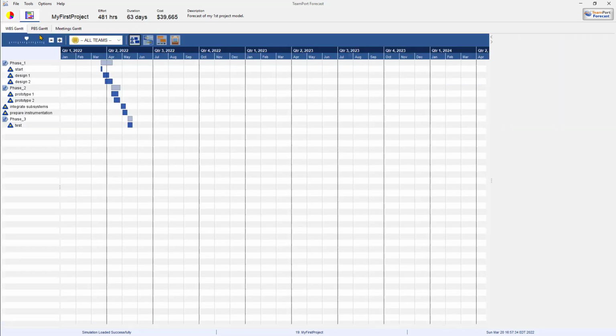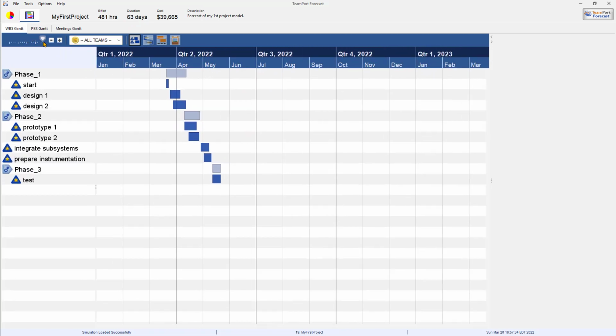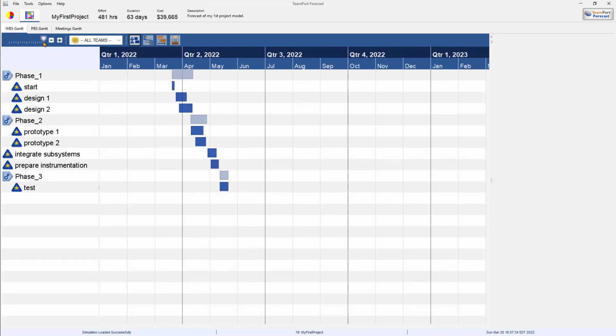A Gantt chart is also generated, and this may be a bit surprising and important. In project design, the Gantt chart is not an input, but an output. That is, the duration of tasks is not known ahead of time, but is an emergent result of how the tasks are defined, their scope and complexity, the resources allocated to them, and how they fit in an overall project topology.